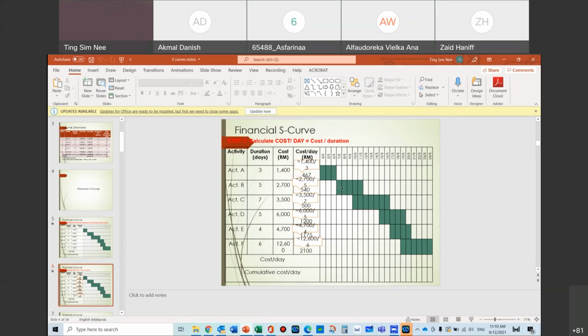But in real life projects, you don't do that. You actually don't spend equally. Normally, you will have either something more in the beginning and then something flatter at the end, or something very low in the beginning but you pay a lot of money at the end. You may even have nothing in one month, and then equal amounts over the next few months. So this spreading of money over the timeline is what the project manager decides. You need to know the nature of your work to do a good spread.